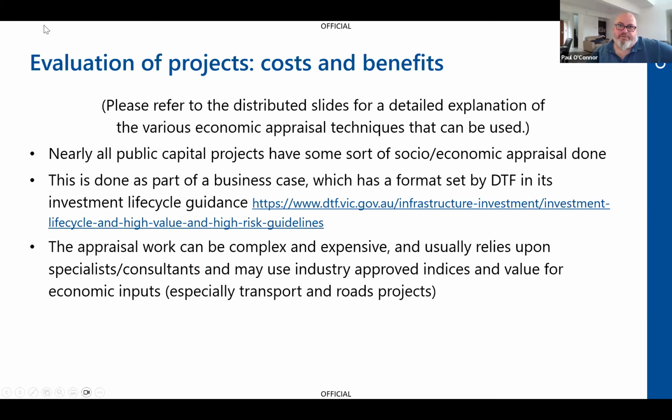I think what we also have to realise is that the appraisal work can be complex and expensive. The public sector usually relies on specialists or consultants, but they can often use, particularly in transport projects and sometimes more and more in health projects, industry-approved indices. It's a bit like how quantity surveyors will use indices to work out the cost of concrete and gravel and how many cubic metres per wall.